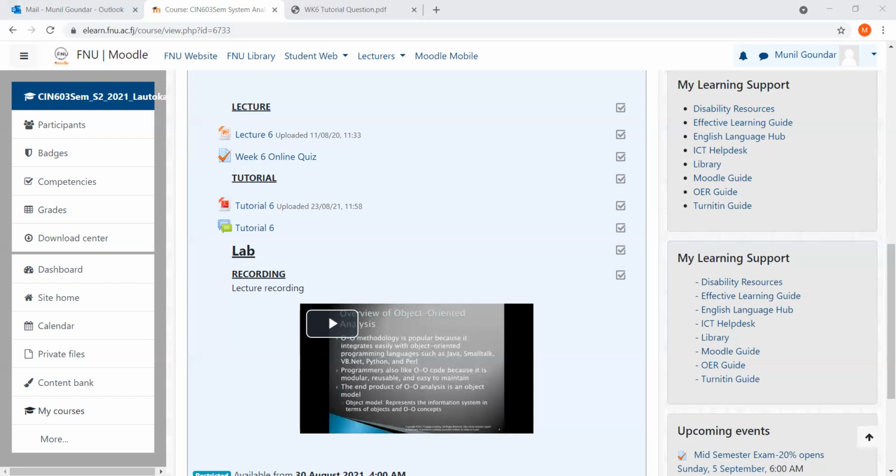So 7th of July, 1 day. Now, activity F has a predecessor of activity C. Activity C finishes on the 6th. So over here, you'll also have your start date as the 7th of July. It's 2 days. 7 plus 2 is 9. Minus 1 gives you 8. So 8th of July, 21.